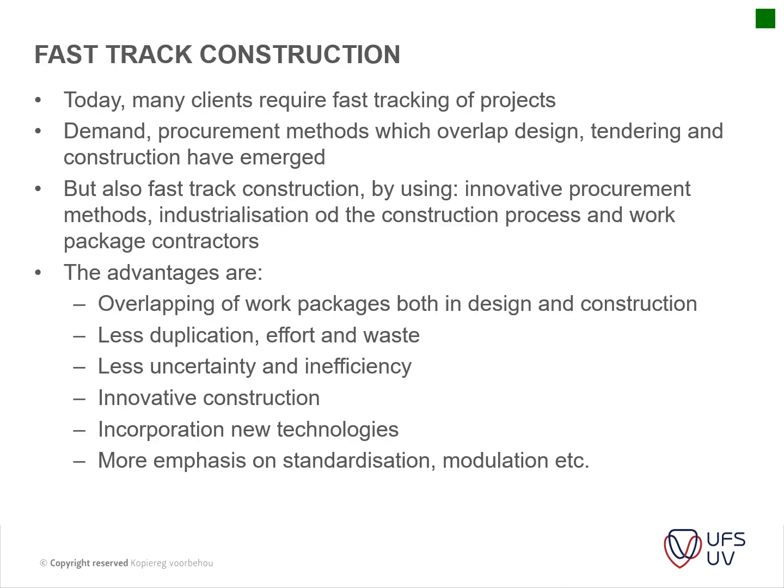So fast-track construction. Today many clients require fast-track construction because, whenever the money is approved, they want to try and spend their money as quickly as possible, because otherwise they have to pay the bond costs, etc. Or if it's public enterprises, then that money should be spent within a certain financial year or so. That's why fast tracking is sometimes so important.